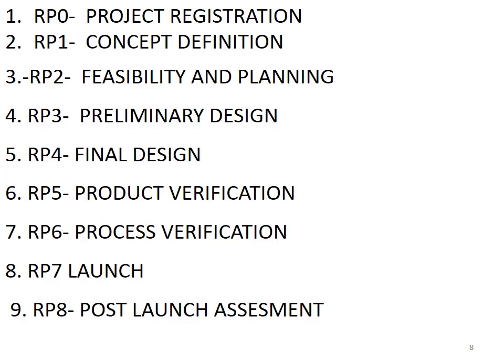RP1 is the concept definition. RP2, feasibility and planning. Third one is the preliminary design. Fourth one is final design. Fifth, the product verification. Sixth, the process verification. Then go for the launch. And then the post-launch assessment.